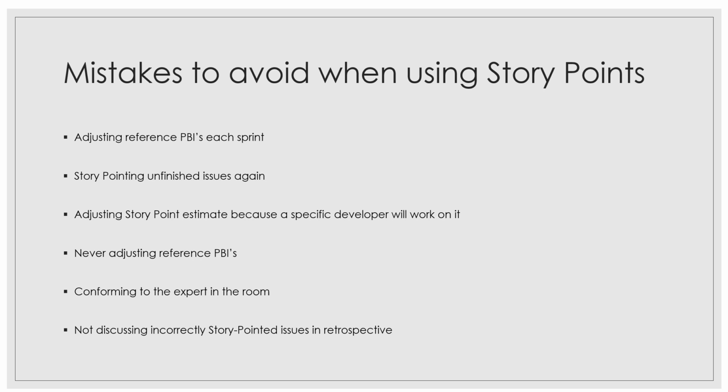So you cannot keep anyone out of the estimation process. Team members story point the product backlog item and reach an agreement on the estimate in the planning poker session or whatever tool you are using. A product backlog item may be 3 story points for a senior developer, but 8 story points for a junior developer. So the team should reach an agreement on how much work it represents for the team and use this.